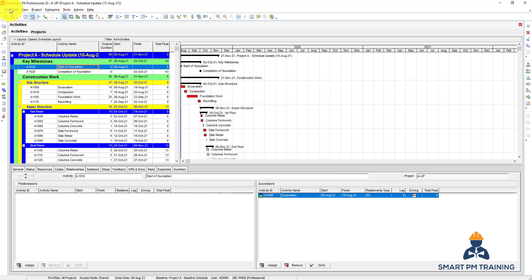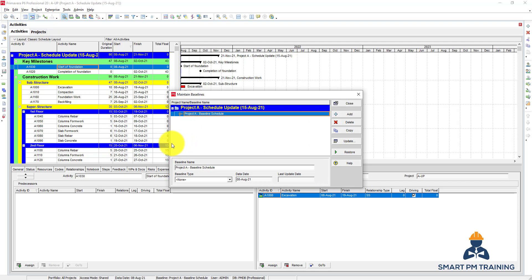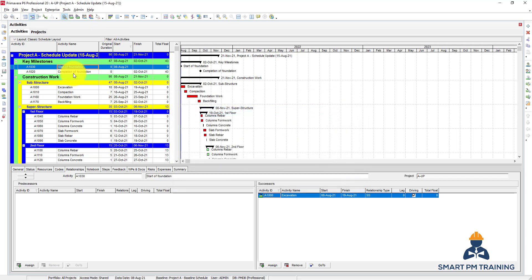Choosing Maintain Baseline does not assign the baseline yet. You can just keep a list of schedules you want to use for comparison later, but it does not assign the schedule. In the next lecture we will talk about how to update the schedule.